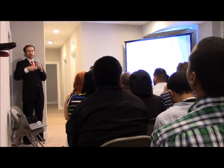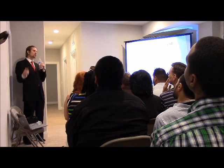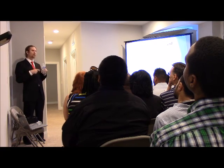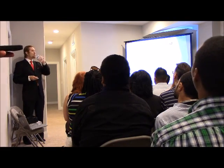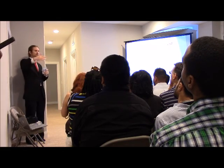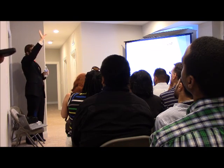In the future, if we were to do this house again, we could actually shave time. From when we broke ground to what you're seeing today was about 6 months. If we can get that down just by doing this one thing differently, we'll be able to get our next project down to 5 months, which is eliminating the front deck. Have the basement extend in front of the main floor.